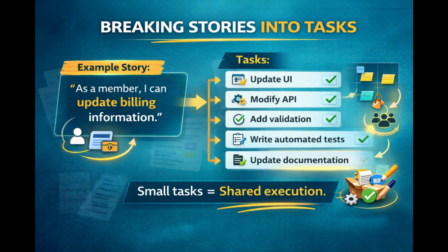Breaking stories into tasks. Let's take an example. User story. As a member, I can update billing information. That story might break into tasks like update the user interface, modify the back-end API, add validation rules, write automated tests, update documentation. Smaller tasks create clarity. They allow work to be shared. They expose hidden effort. They reduce surprises.